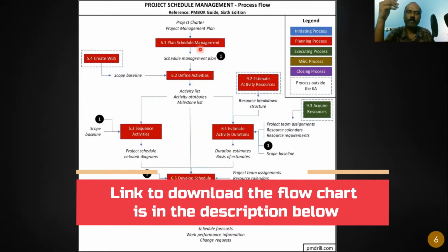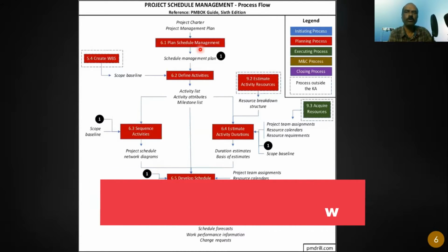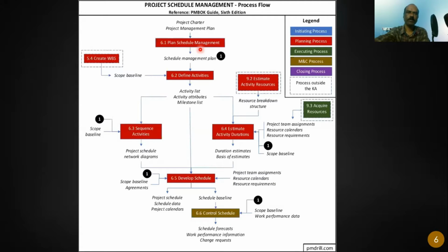So what is schedule management plan? It is a procedure. It is a step-by-step process where we are clearly writing down how to create the schedule. So in schedule management plan, you are going to write down what is the scheduling software you are going to use, what is the scheduling methodology you are going to use, how you are going to estimate the durations, how you are going to sequence the activities, what technique are you going to use, what methodology are you going to use.